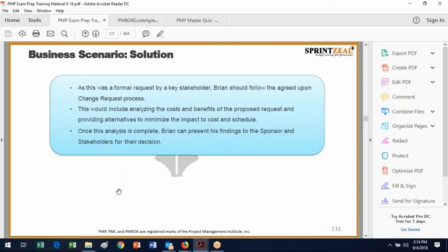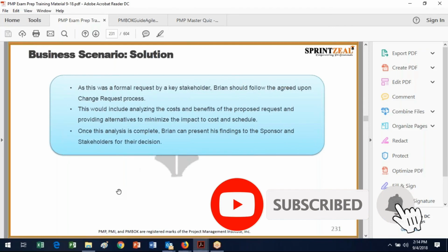and submit this. Brian's current project is currently under budget. Well, it doesn't matter that that one's currently under budget because this is an add-on. So it's like a separate deliverable. So I'm not 100% sure. I mean, that's how I would handle it. I'd put through a change request. It's an add-on to an existing project.